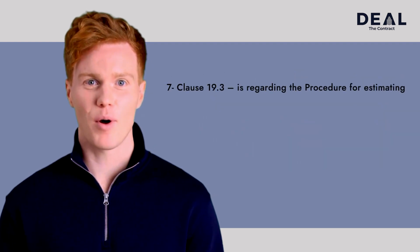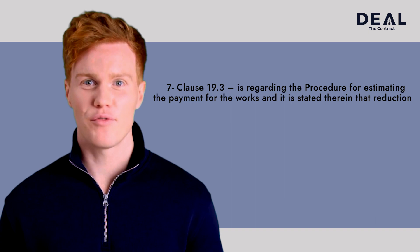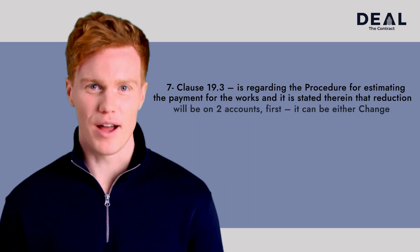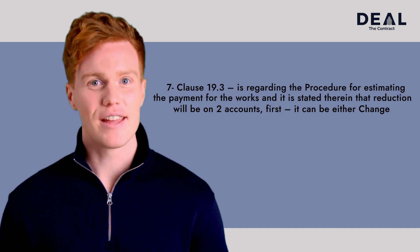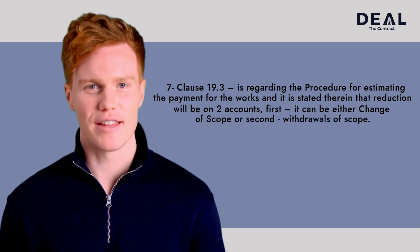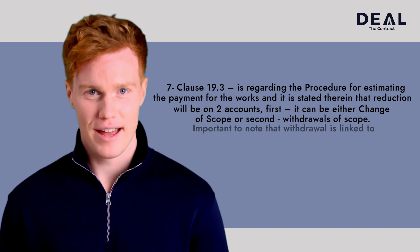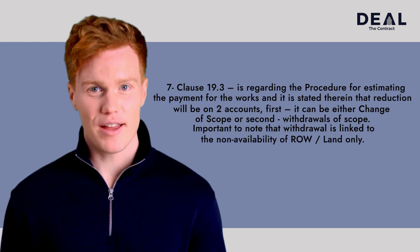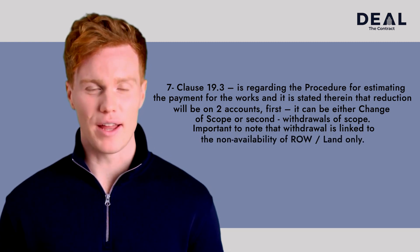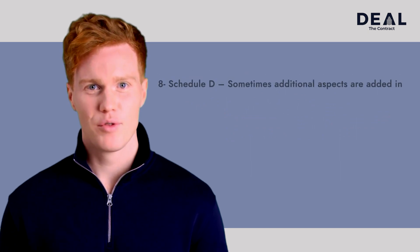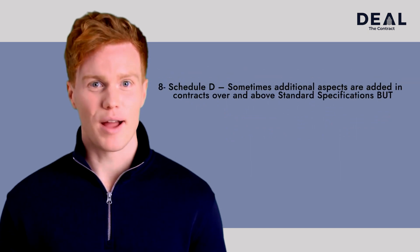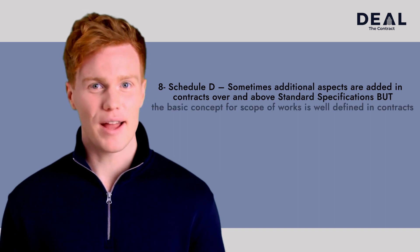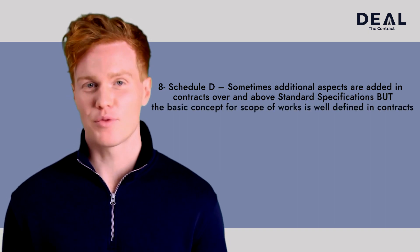Seventh, Clause 19.3 is regarding the procedure for estimating payment for the works. It is stated therein that reduction will be on two accounts: first, either a change of scope, or second, a withdrawal of scope. Important to note that withdrawal is linked to the non-availability of ROW or land only. Schedule D sometimes has additional aspects added over and above standard specifications.